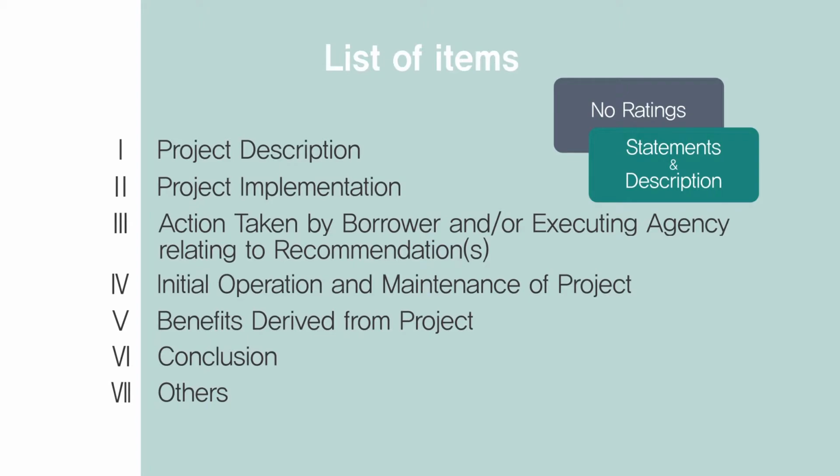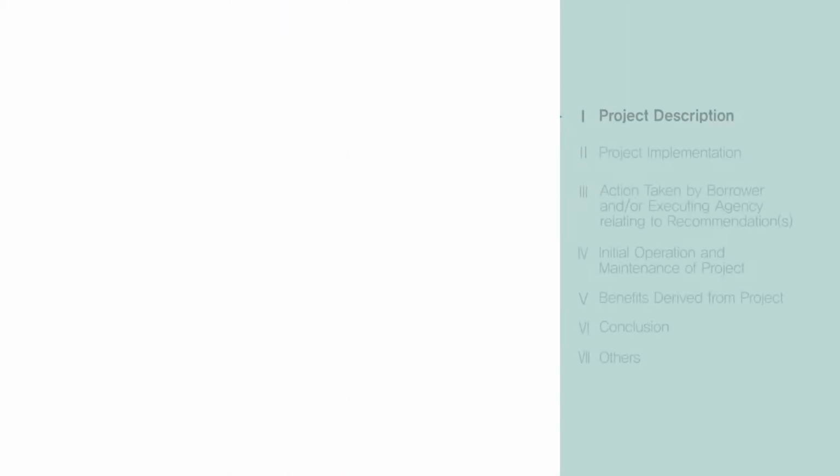As a lot of data and information is required in drawing up a complete PCR, the borrower should collect as much data and material as possible on items in the PCR form during the implementation period. Also, the borrower should indicate the source clearly when citing other sources. If the space provided in the PCR form is insufficient, a separate sheet should be attached, explaining everything clearly.